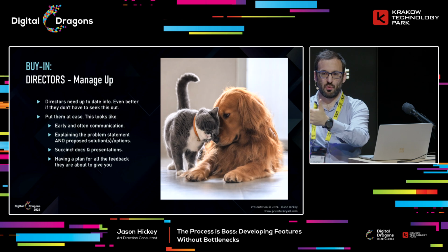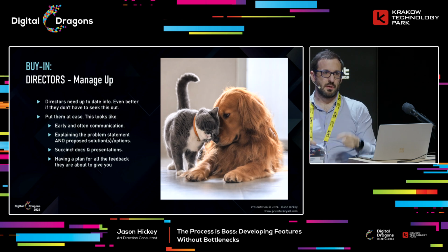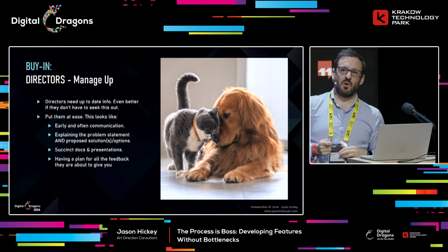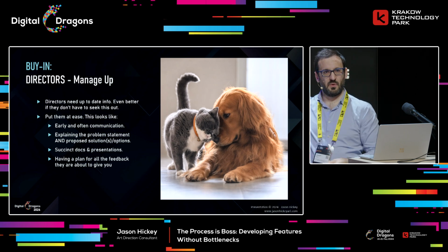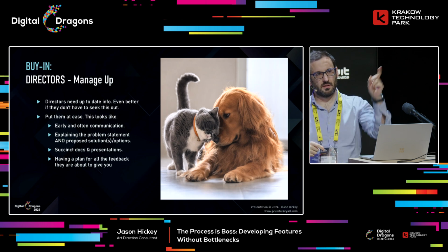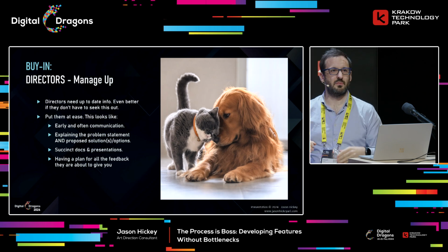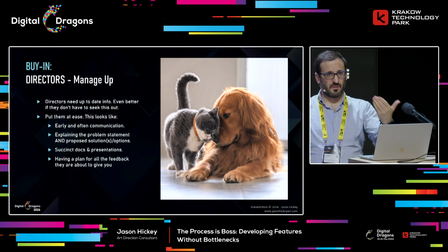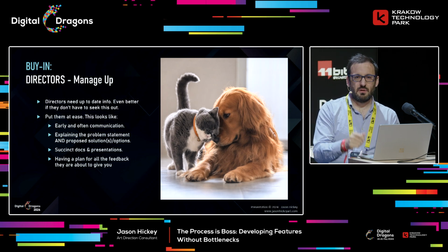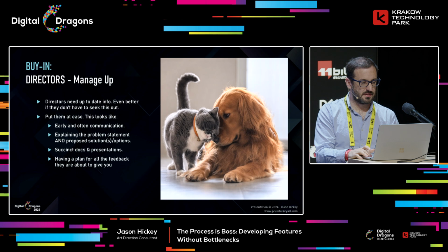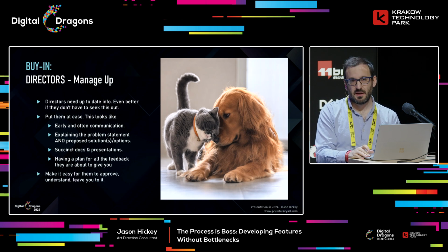We would write up all of our feedback on how we were going to address those issues before we had the review. So when you went to the review, they'd say, well, we've noticed it's quite noisy and I don't know where to go. And you'd say, yeah, what we're going to do is in week 2, next milestone, John is going to do a lighting pass, and that should bring it down, do you know what I mean? So when the director goes into their meeting, they're like, oh, cool, I don't have to worry. They've got this. That annoying phrase. So make it easy for them to approve, understand, and leave you to it.